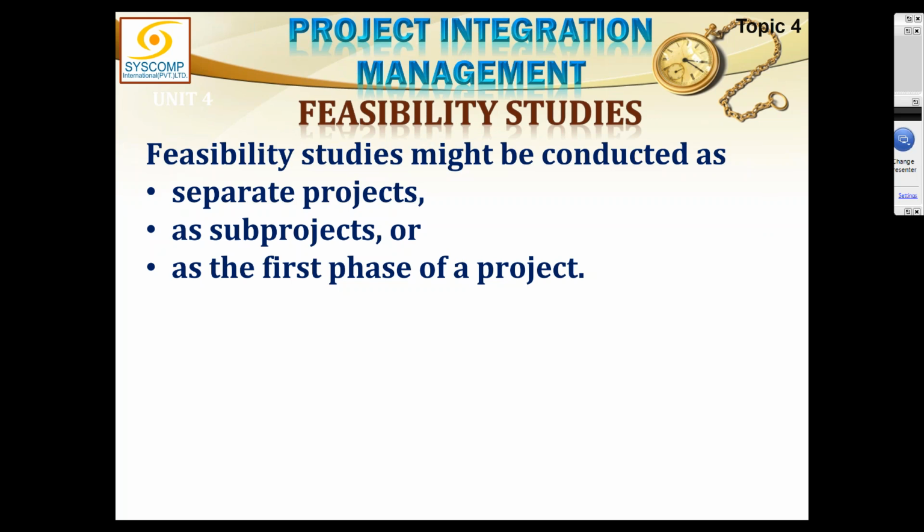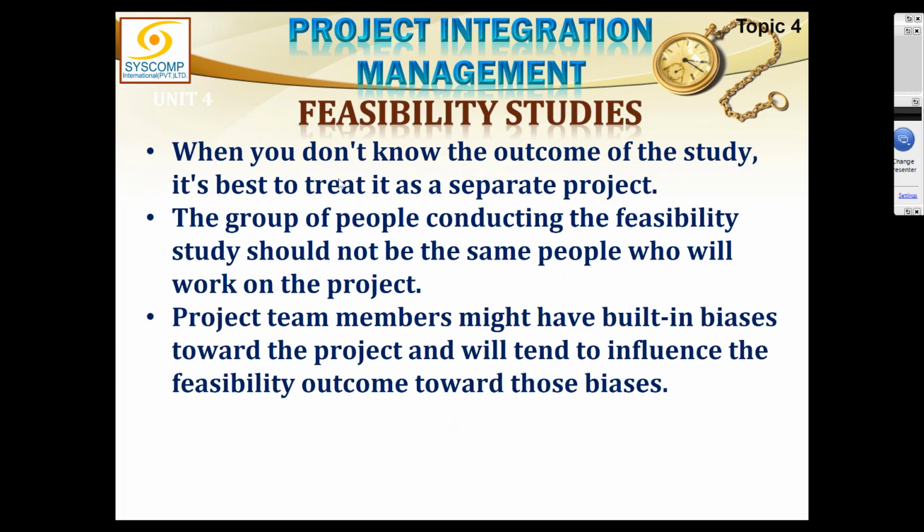No, you should first decide from where your project should start. Should it start before the feasibility? Should it start after the feasibility? Should feasibility be part of my project as a sub-project or as a phase or as a separate project? Whatever you decide, you can do that. Because creating a feasibility study is in itself a project. When you don't know the outcome of the study, it is best to treat it as a separate project.